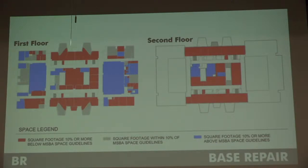For instance, the boilers in this building are 47 years old, well past their useful lifespan. The parts are becoming more difficult to obtain to do maintenance on the equipment. Also, this option would certainly require the use of temporary modular classrooms. That is one construction line item that MSBA would also not support under any of the options at all.